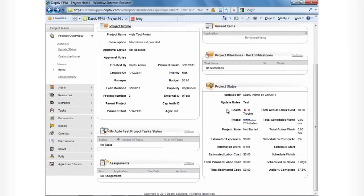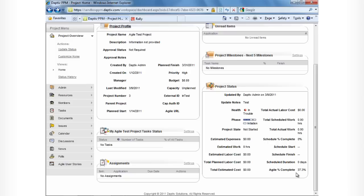Here, we can see Adaptive has calculated the health of this project is in trouble. And further down, we can see the agile percentage complete is 37.3%. This is calculated by taking the total story points accepted for a project over the totality of story points for that project.